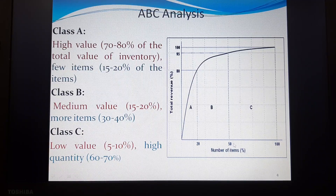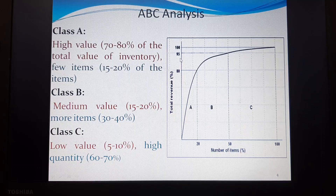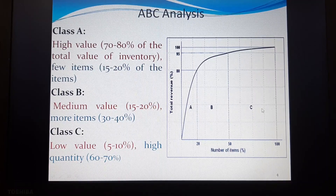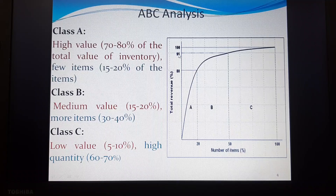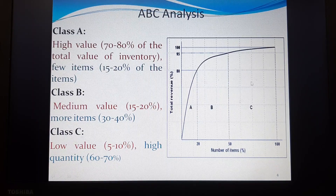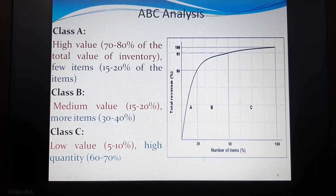In Class B, there are relatively more items — almost 30 percent of items — but they have a medium value, approximately 15 to 20 percent of total inventory value. Class C has very low value — only about 5 to 10 percent of value — but a high number of items. Around 50 to 60 percent of all items belong to Class C, which has the least value.